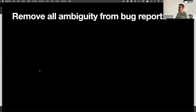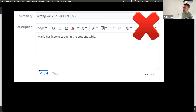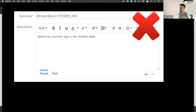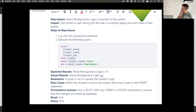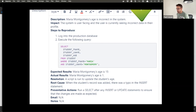Remove all ambiguity from bug reports. A bad example is a bug with just a variable name or a line or two — there's not enough to go on. A good bug report has steps to reproduce, and ideally a video or image for UI issues. Most importantly, every ticket — new feature or bug — should have acceptance criteria with exact values I can write unit tests against. Use things like Cucumber tables to get really good examples and remove ambiguity from work items.